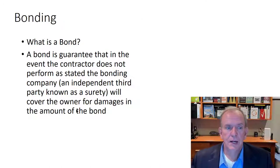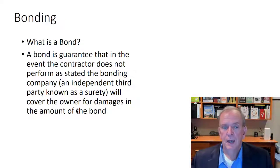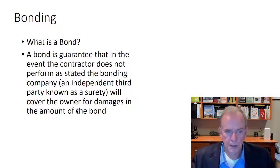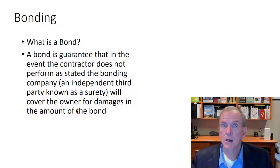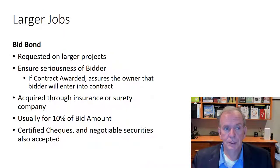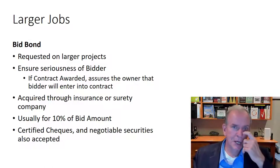If you're sitting there and you had a three million dollar bid and somebody else has two million while everybody else is around two million nine hundred to three million, that person with two million likely made a mistake. If it's a public project, that's where bonding comes in. Bonding is a guarantee that in the event a contractor does not perform as stated, the bonding company — an independent third party known as a surety, usually an insurance company — will cover the owner for damages in the amount of the bond.